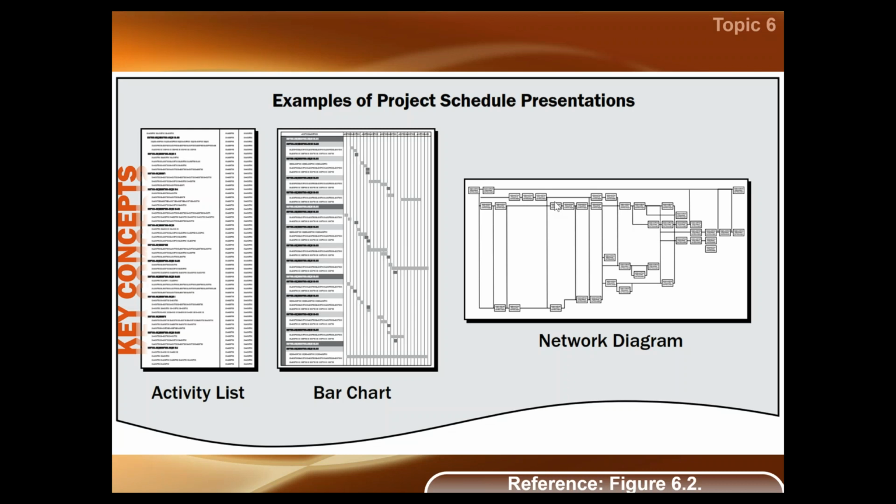any shape of project schedule, no matter which instance it is, the very first model or any of the subsequent instances or the final baseline, could be represented in a number of ways. I can show this data in a tabular form. I can show all of this data in a shape of a Gantt chart. I can show it in shape of a network diagram, or there could be 100 other possibilities how I can show this data. These various shapes any instance of project schedule can take are called project schedule presentations.